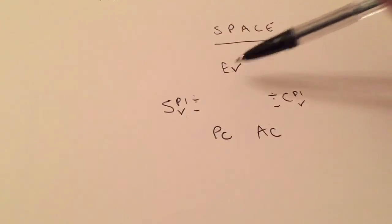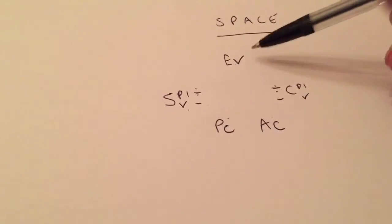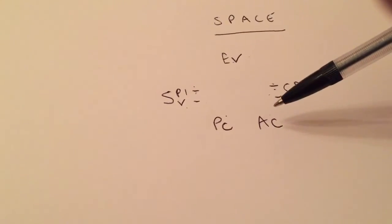SV, earn value minus planned cost. And CV, earn value minus actual cost.